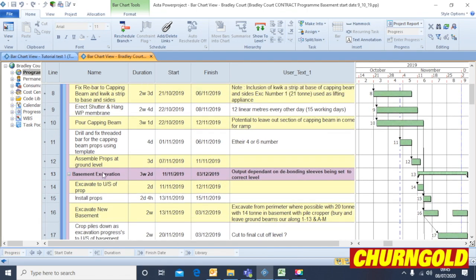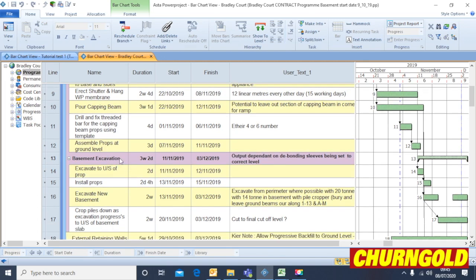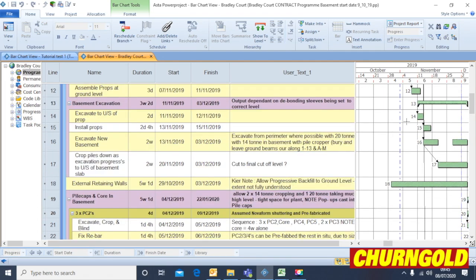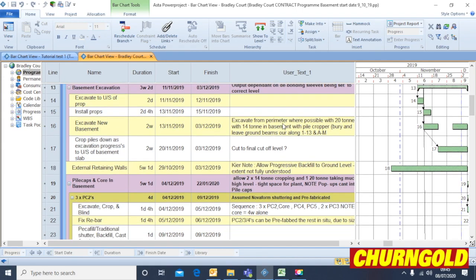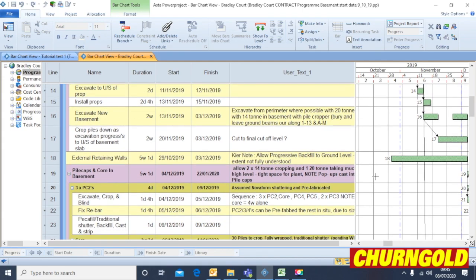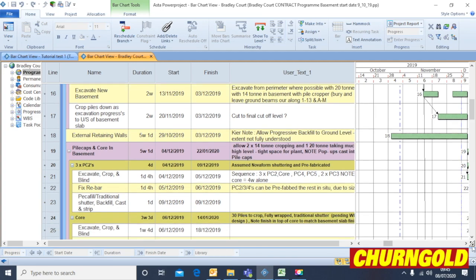And once upon the completion of the capping beam, and the props are installed, then we can continue the basement excavation. So it's just a continuation of a series of tasks built up. And that go down and down and down.